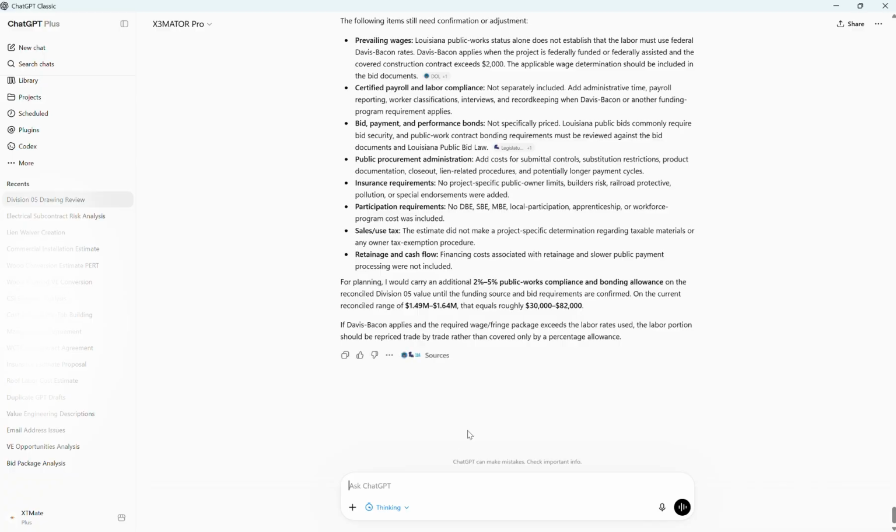Take one example: wide flange beams and girders, about 33 tons, priced by the ton with separate material, labor, and equipment rates, extended out to roughly $165,000. And right next to it, a confidence note telling me the member lengths were inferred from grid spans and need CAD verification. Every line in this estimate carries that same discipline.